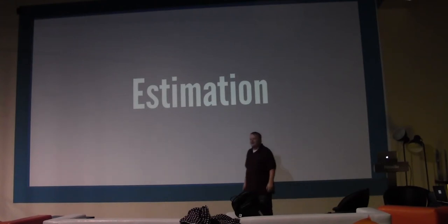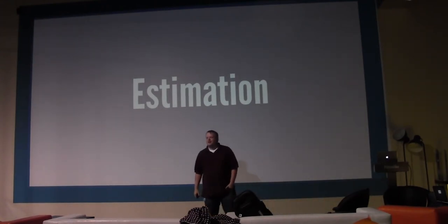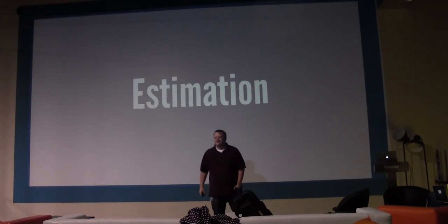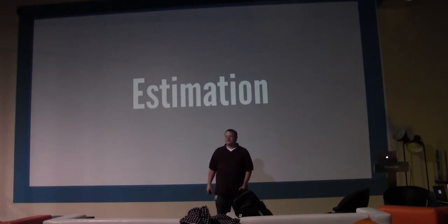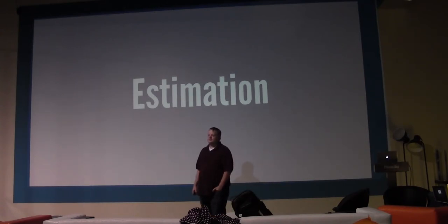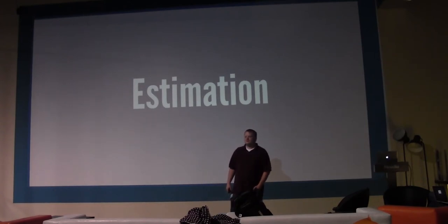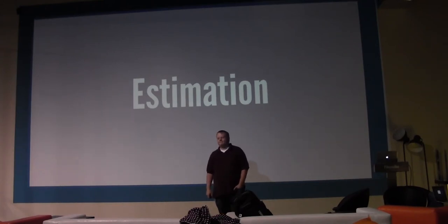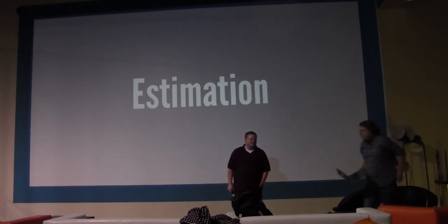Yes? I don't know if you want people to add to this, but I just want to say retrospective really is useful. One thing we have just started doing lately, because people do complain about another meeting, and some of them don't want to talk and some of them do, is a virtual retrospective. I create a Google Doc and share it, and I give them a couple of days to start putting in items. Then at the beginning of our sprint planning meeting, we allocate a certain amount of time to review that, and we end up adding more because more comes up. It relaxes people a little bit. And those who don't want to say something in the meeting can put something on the virtual board without feeling uncomfortable about vocalizing it.